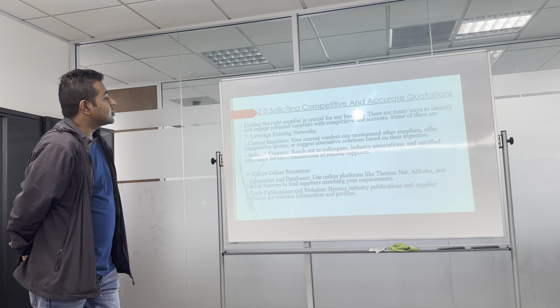Cost competitive assessment. Compare quoted prices side by side. Ensure they are based on the same quantity, specification and delivery terms. Consider hidden costs. Factor in potential additional charges like transportation, installation or taxes. Evaluate long-term cost beyond the initial purchase price. Consider maintenance, warranty and potential downtime. Negotiate for volume discounts or extended payment terms, which impact the overall cost competitiveness.